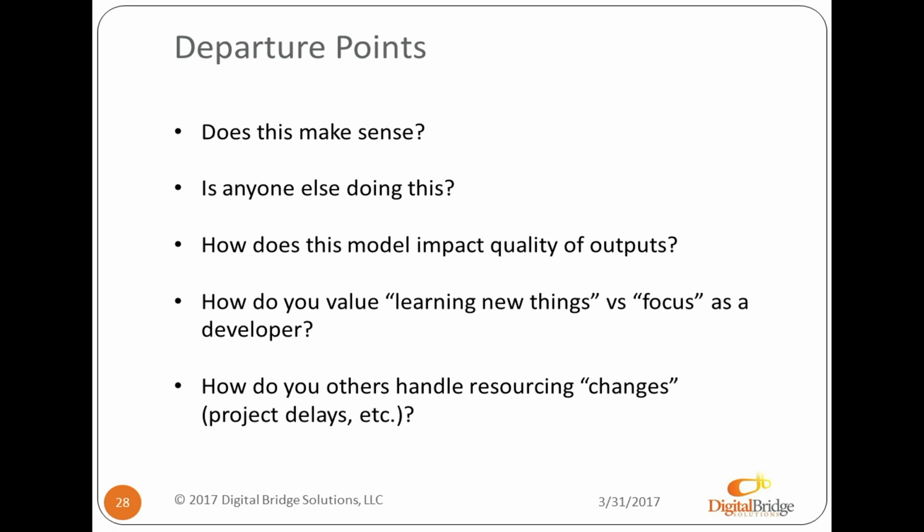Just a couple questions that I hope are small. Timelines, because you're paralleling and now resources are a little bit, that also means that each individual project has a longer time of life in your development cycle, right? Potentially, yes, although to some extent, I think you could argue that a 14-week project that you're billing out at 40 hours a week, there's enough waste and slack in that if you just estimated it off of the task time, you may only have 20 hours of actual work. And so maybe if you have that person allocated across multiple projects, maybe you still can get it done in 14 weeks, or maybe you add on a week or two, where you don't substantially stretch out the timeline.